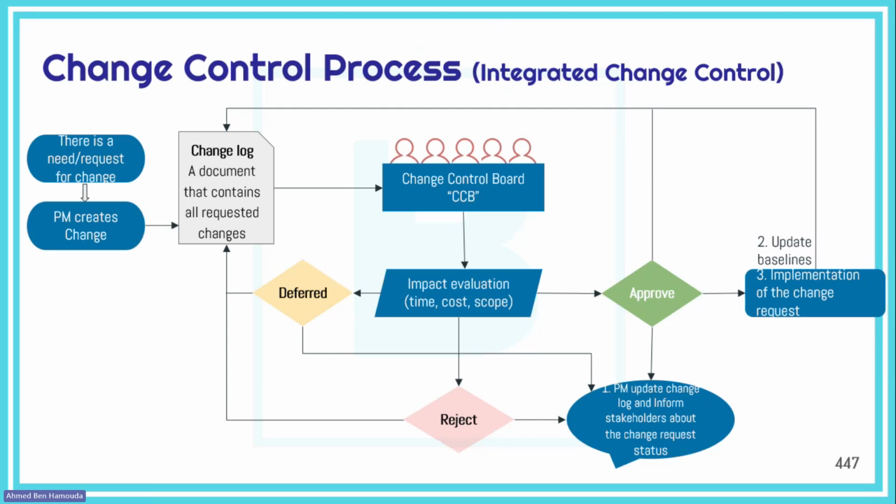All right. So then let's suppose I have just one change request. Then we schedule the meeting with the change control board, and I send them the change request, the filled out template of the change request, in advance. And then during the meeting, of course, it's my chance. It's either me or a stakeholder or whoever is really engaged in that change request. So the request for the change is presented.